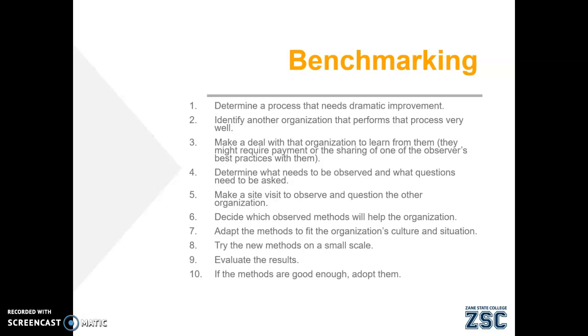So you then need to determine specifically what you would like to observe and make a site visit, observe it, ask questions, just essentially learn how they do things. Decide then, based on your observations, which of their methods you think would help your organization, adapting those to fit your culture, because the way that your competitor or another organization does things may not exactly fit with your organization. So some adaptation or modification might be needed.